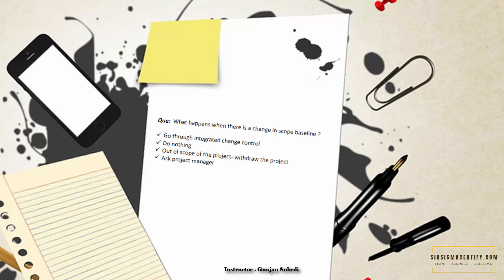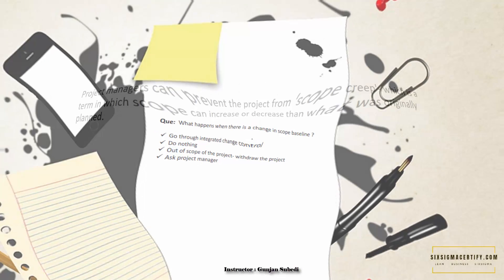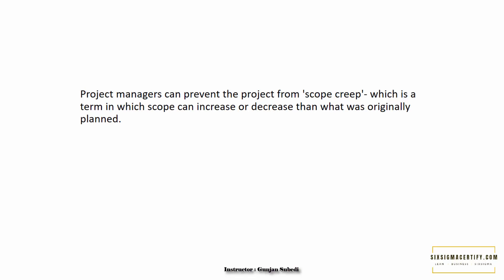The options are: we go through the integrated change control; we do nothing; this is out of the scope of the project so we withdraw the project; or we ask the project manager. Whenever there is a change in scope baseline, we have to go through the integrated change control process. So what is the importance of defining a scope or scope baseline?